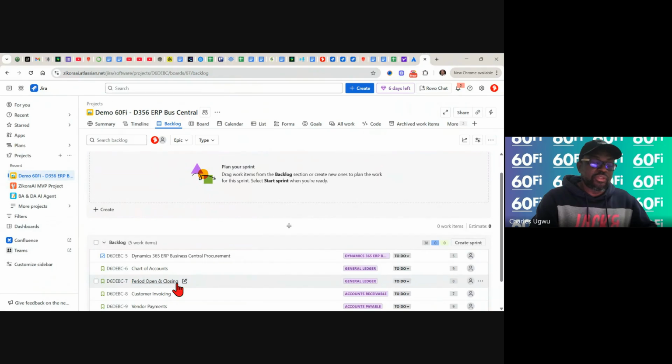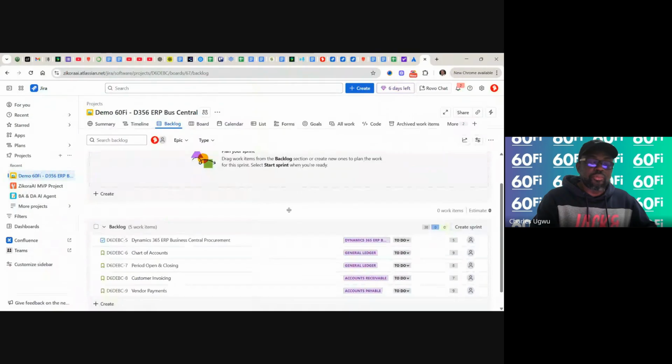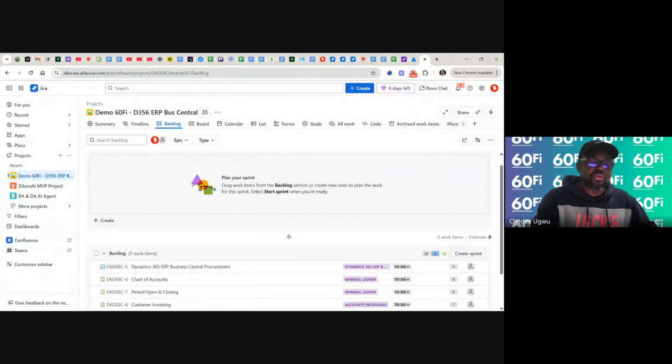The business analyst is here to assist, and the Scrum Master, your work is to guide, make sure everybody is working safely, everybody is doing what they are supposed to do, and we are on course of delivering within the expected time. And the developers, your work here is to do the work. Then who decides what is to be done is called the product owner. He owns the product backlog. What he decides is what is going to be done.